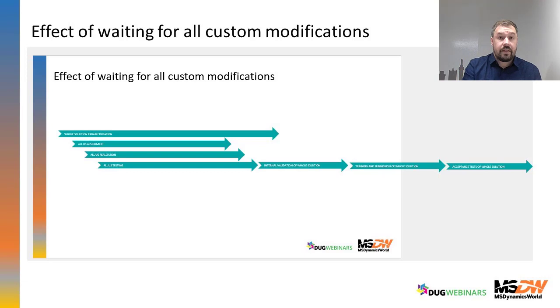Another negative effect: instead of that, just now everybody is working in-house. Just now the effort is here. The customer is bored, waiting, a bit nervous. With process after process, you can quite easily give him the first touch with the system. You can start to teach him the first things, and he feels something is going well, something is happening. And in this, they are quite nervous.